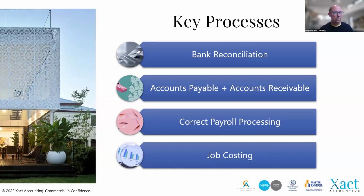And then, of course, job costing. If you set up your two categories, not everybody uses the two categories, but I have noticed more and more builders are starting to use those two, where they've got the first layer job code, second layer activity, which is like your plumbing and carpentry and drywalling, all that sort of stuff. When you run your report, if you make sure that all the data that goes in is correctly allocated, you won't have to do the big cleanup afterwards. Why does my bottom line look like this? Now I have to go dig in the data to find these transactions and reallocate them. So it's really good practice and good habits to make sure it's coded correctly before it actually goes into the accounts. If you do it right the first time, you don't have to do a big cleanup afterwards.